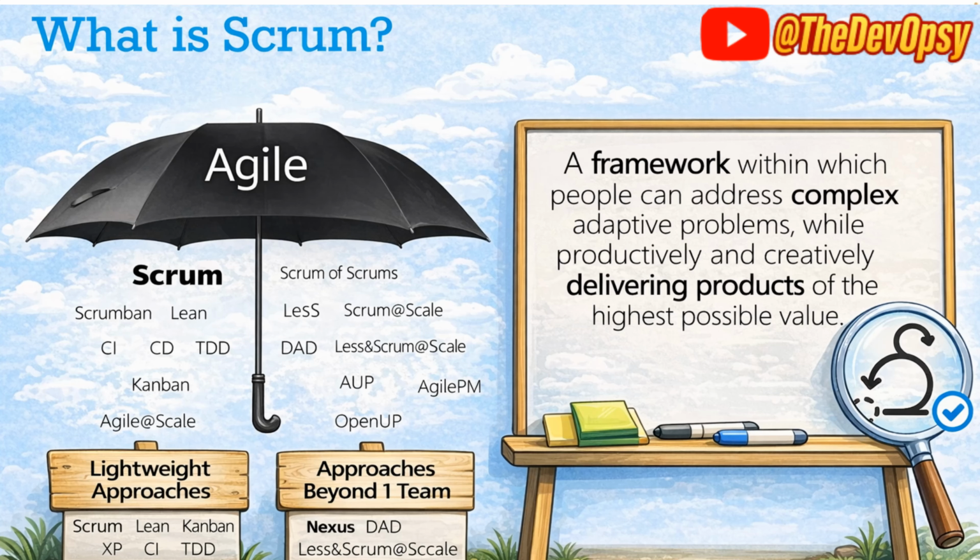Scrum values, and this has been taken from scrum.org. So the base start of Agile, we start with Scrum, and depending on the team. For example, if you see Kanban, bottom left, Kanban is a framework which actually focuses on a continuous flow of work, especially working with support teams. When you have a support team where the requirement comes so fast that you have to first start something, finish that particular stuff, and then pick up some other task, that's the kind of environment where we use Kanban.